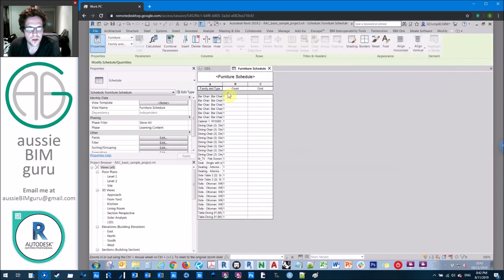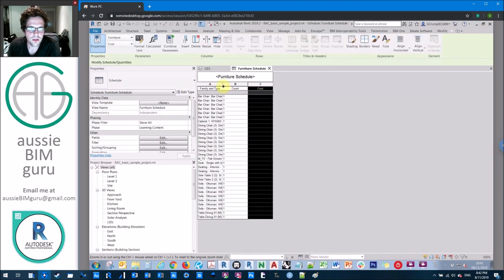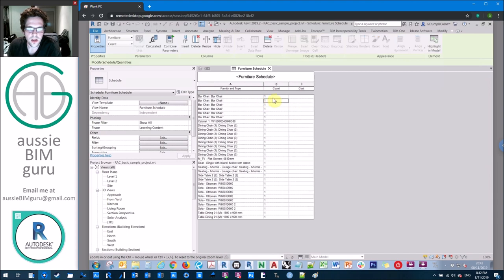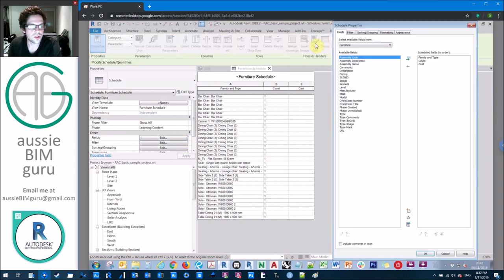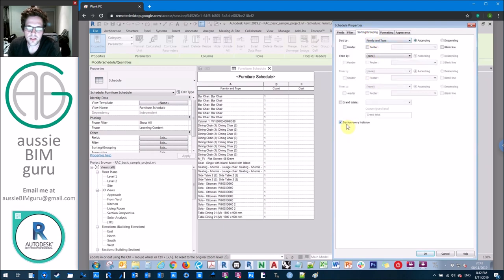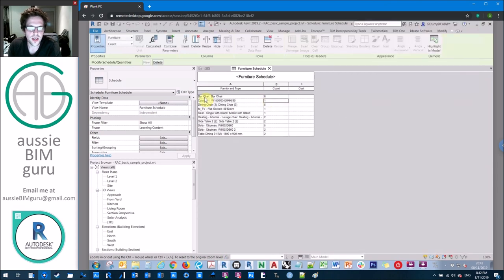Under sorting and grouping, we'll sort by family and type. What we get is an itemized schedule where every row represents one element — count is always one. We don't want this. We want to de-itemize the schedule so rows represent the sorted element. Just tick off 'itemize every instance' and depending on how you've sorted, it will clump them together. Now this row represents all six bar chairs in the project, and the count has accumulated how many occur in each row.